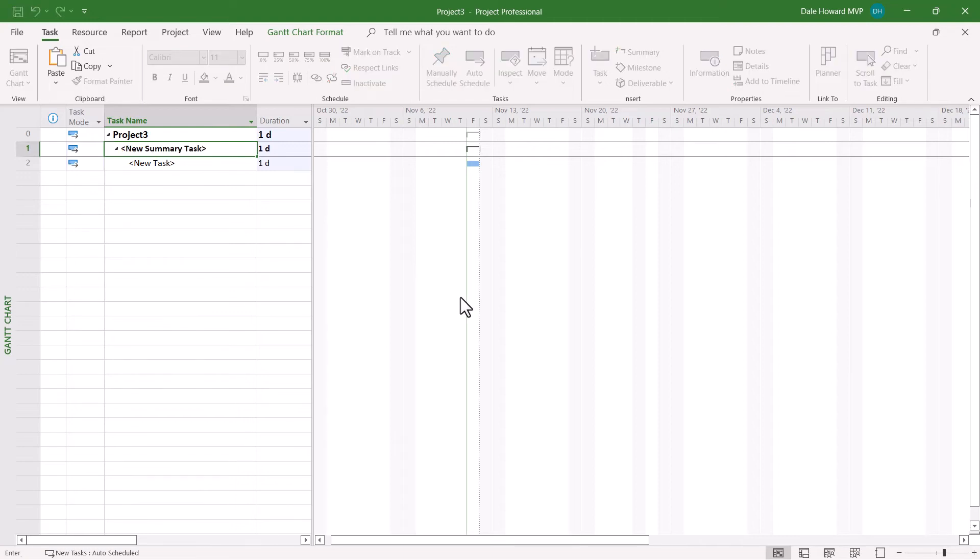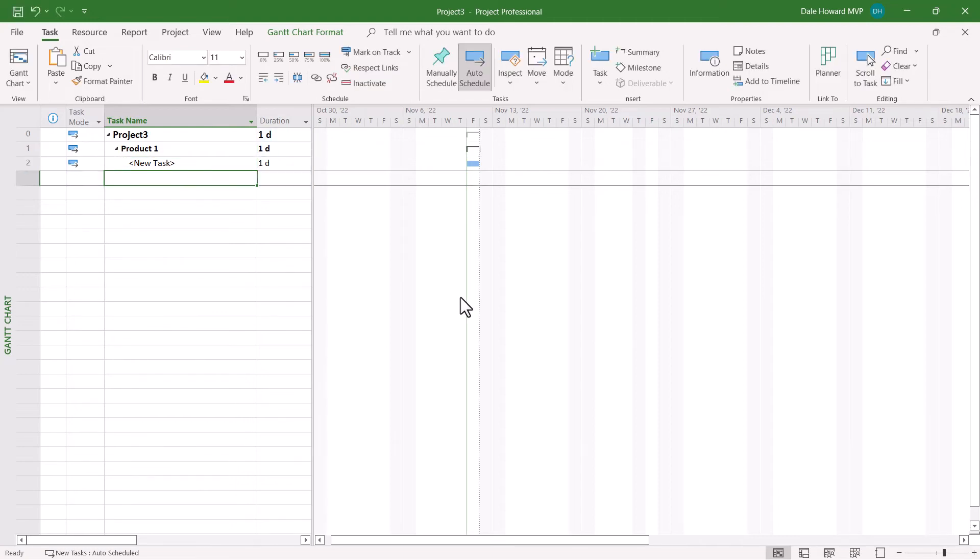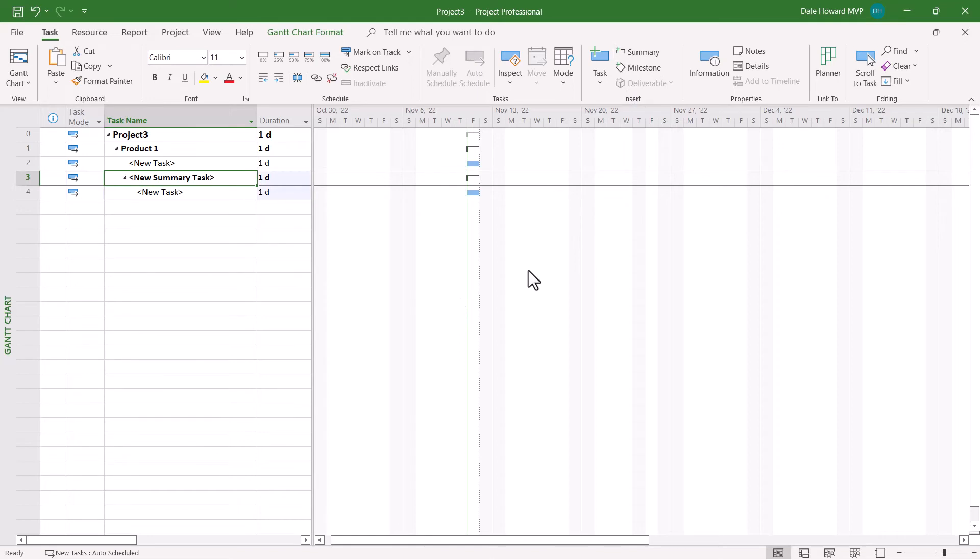So in keeping with the last project, I'll call it Product 1. Then go to the first blank row. Click the Insert Summary Task button again. Please notice that because of default functionality in Microsoft Project, the new summary task is indented as the same level as the task above it. This means that I need to out-dent that new summary task.